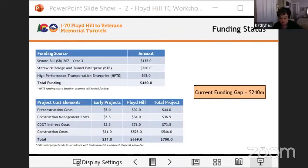Well, I do too. When I saw it on the agenda again, we did approve it, and now it's just with some variation of the possibility of doing both eastbound and westbound. It is an exciting opportunity, because as we know, if you can do the project all at once, it's going to end up saving money in the long run. Are there some questions out there with commissioners on what this is about? This is another resolution, just to clarify that we are going to go for the CMGC type construction, and looks like Commissioner Stanton has a question, but this is for the commission's sake. This is to clarify that we've already approved the type of contract, and now we're going to approve the possibility of additional funding so we can do both sides.